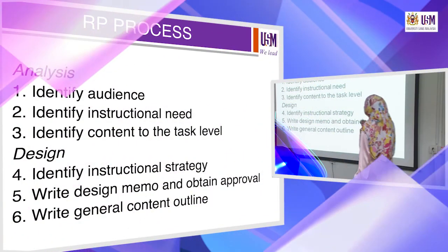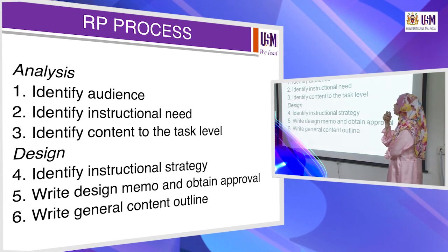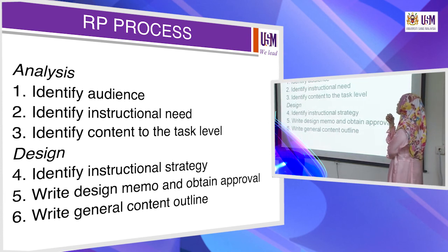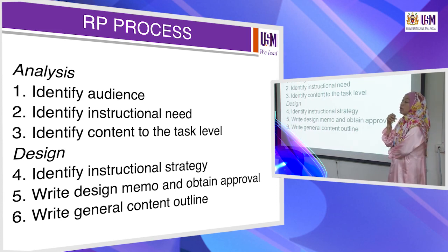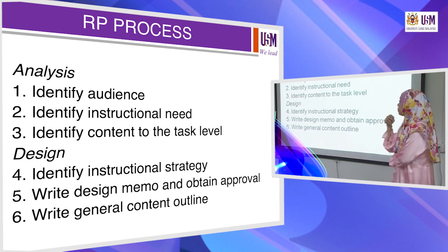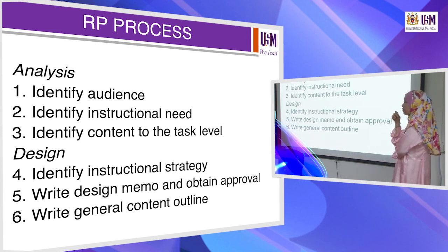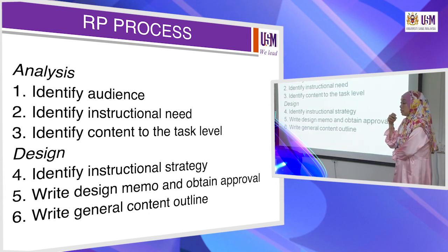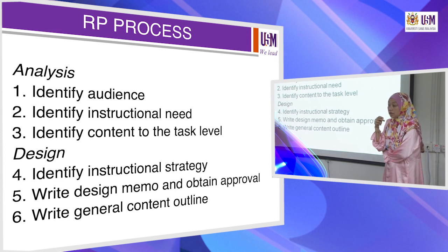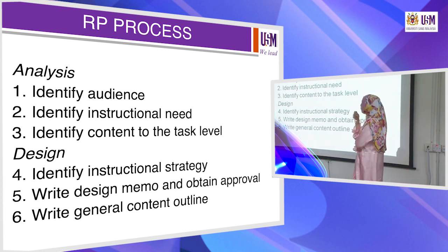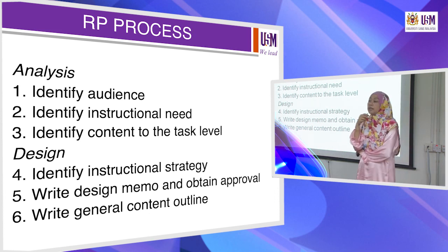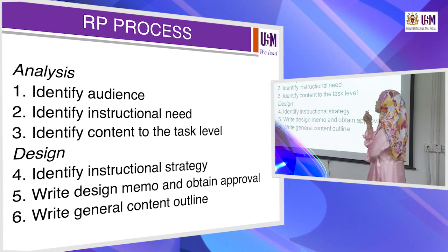The rapid prototyping process involves analysis first. First we are going to identify the audience. Who are the audience? If we are going to use this in our seminar project, we have to identify the audience, for example who the participants are: teachers, pre-service teachers, lecturers, and so on. Then we identify the instructional need. What are the needs of the participants, of the audience?